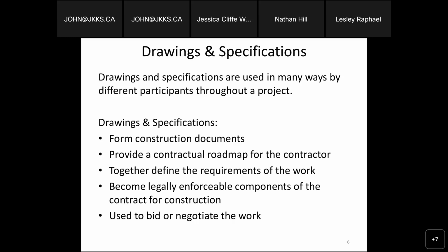So drawings and specifications, as we can see here, offer a number of different features. They form the construction documents, they provide the contractual roadmap for the contractor, they define the requirements of the work, and they become legally enforceable components of a contract for the build or construction. And certainly they are used in the early stages to bid or negotiate on obtaining the work, from the contractor's perspective.